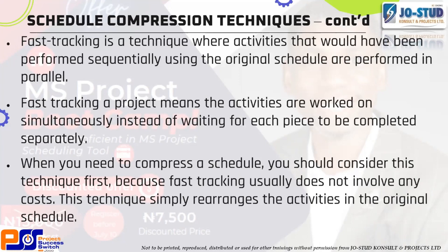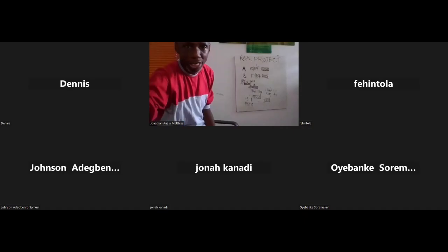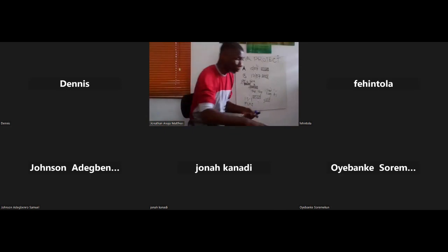So I now asked myself, what is the reason? And I discovered that there were a lot of activities that were put to do that didn't cater for the yearly training. It's actually a training project. So year one, you train this, year two, you train this. They wanted 4 years training. So I now said, okay, for me to recoup the 6 months or 3 months that I used for preparation, I will need to now overlap year one and year two, year three and year four, year five and year six. So initially, let me just show us something since it's a practical example I'm giving now.